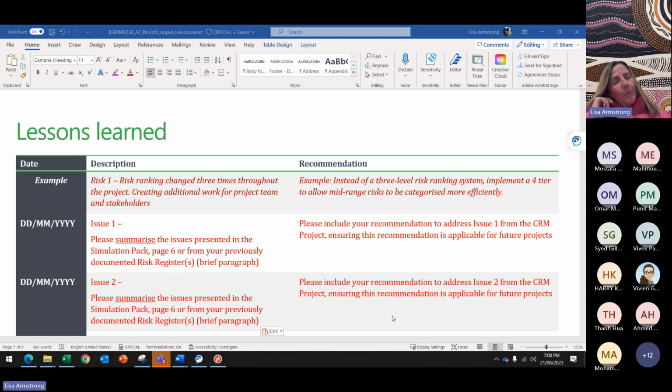I would also add, part of the planning when we talk about our work breakdown, somewhere in there, whether we have a training work package or tasks within a work package, training needs to be identified as a key task. It's a dependency; we shouldn't be implementing a system until that training has been completed. Excellent point. Well done, Steve.